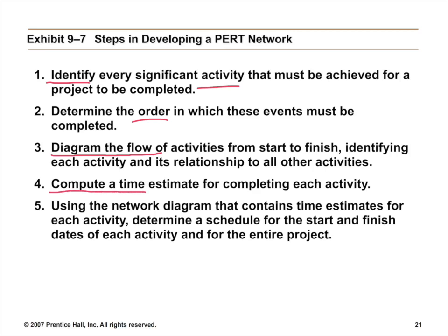Then compute time estimates for completing the activities, and using the network diagram that contains time estimates, determine a schedule for the start and finish dates of the activities and for the entire project. And then we can predict the time for the entire project. That is the steps in developing a PERT network.